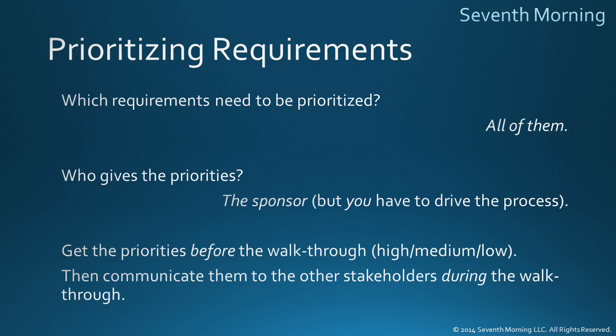After the prioritization is complete, if any additional requirements come up, they can simply be assigned a priority when you review them. And prioritizing individual requirements is a lot less time-consuming and easy than prioritizing all the requirements in bulk.